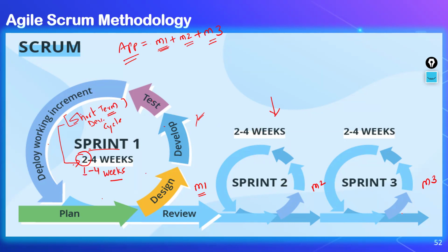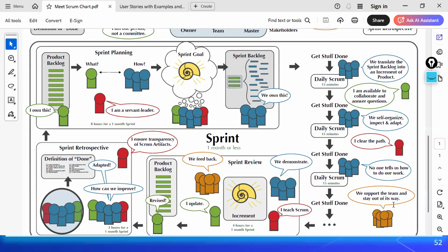So you'll have that retro meeting after every sprint just to discuss any bottlenecks and what were the good things. The good things you have to foster in your upcoming sprint. Bad things you have to fix before you start your next sprint. So it's all about making the overall process better and better. That is what these retro meetings, or retro sessions, are all about.